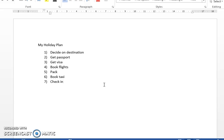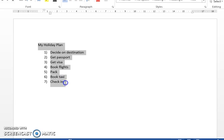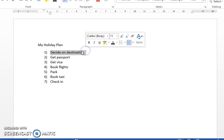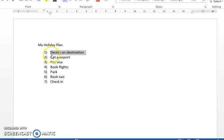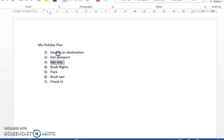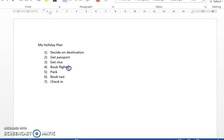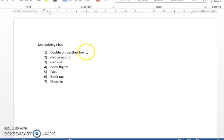So first of all I've just got a Word document here and I've written out my plan as a list. This kind of works with simple projects but there's some things that this list doesn't tell us. For example, if I want to decide on a destination, do I need to do that before I get my passport or can I get my passport first? Do I need to decide on the destination before getting a visa? Well yes I do, and certainly before booking flights I want to know that I've got both my passport and my visa and the destination.